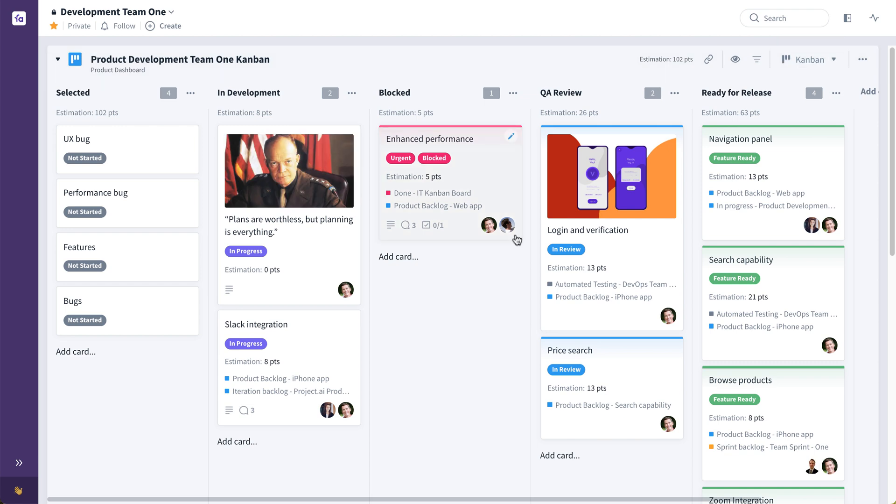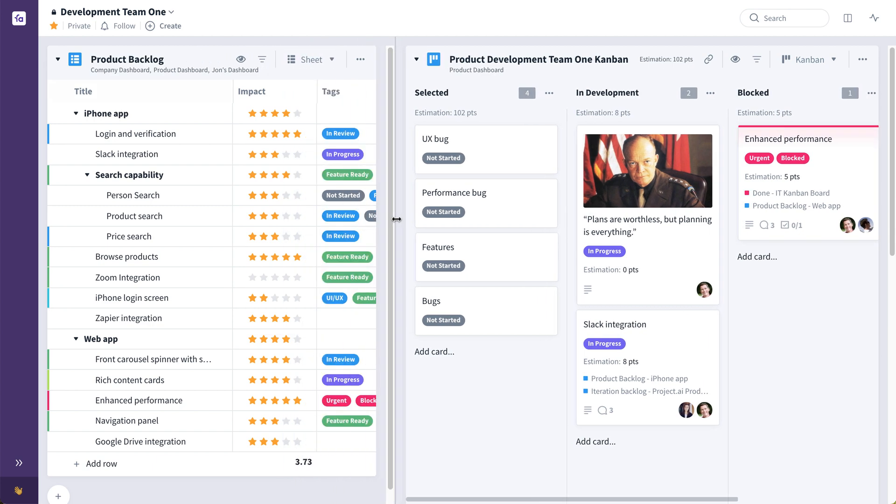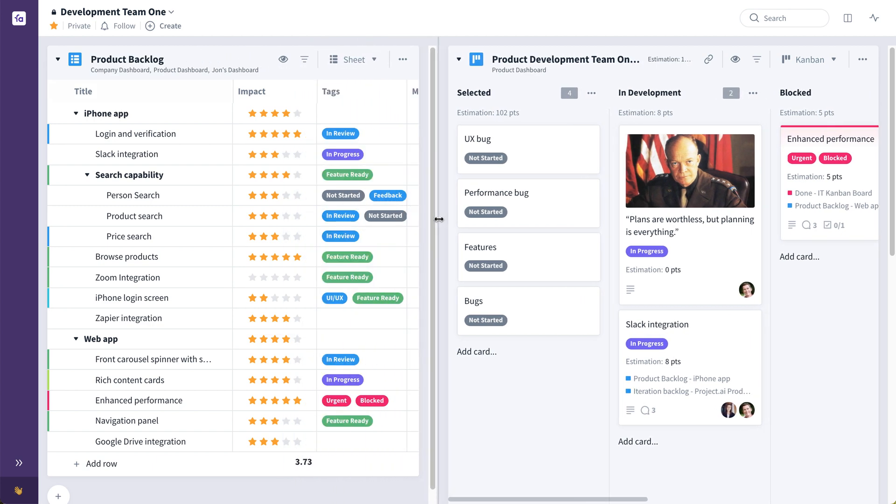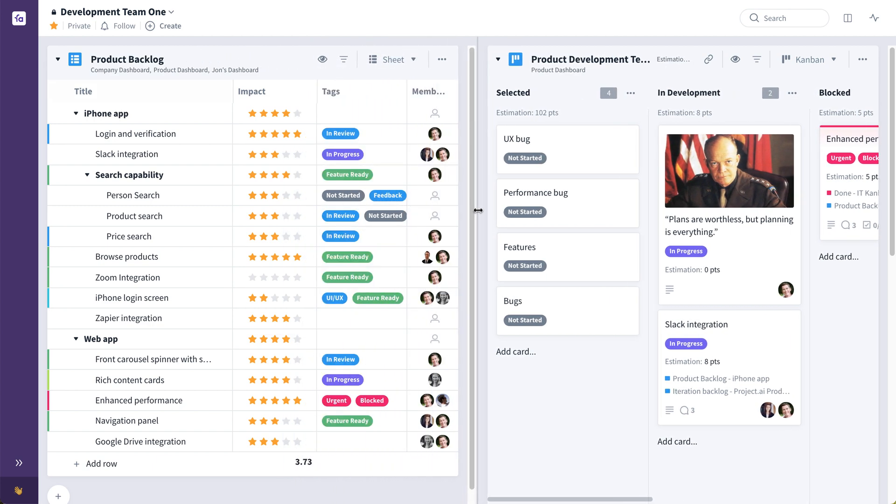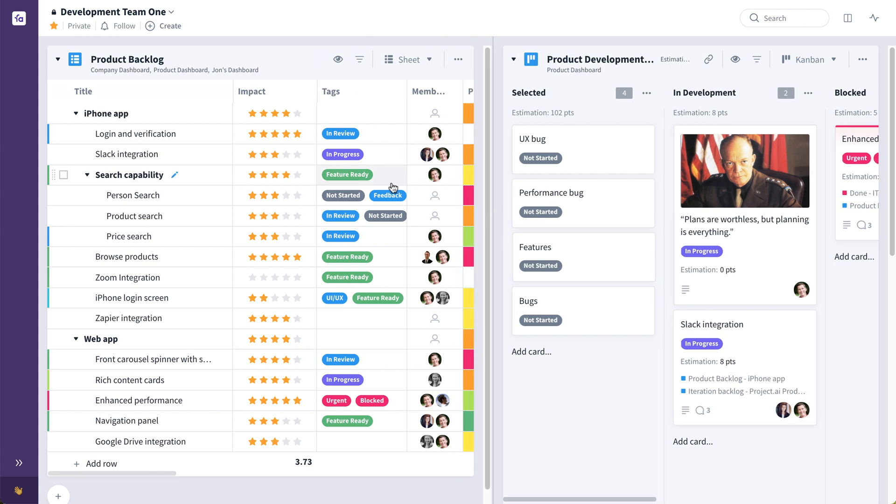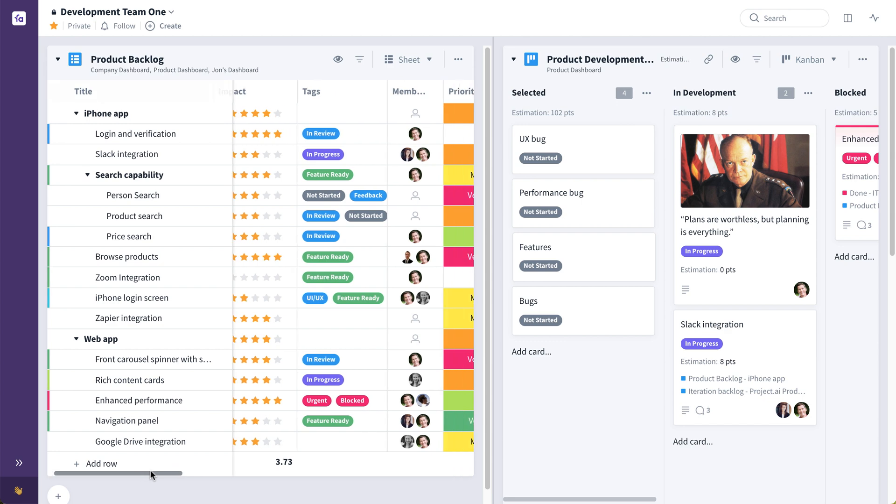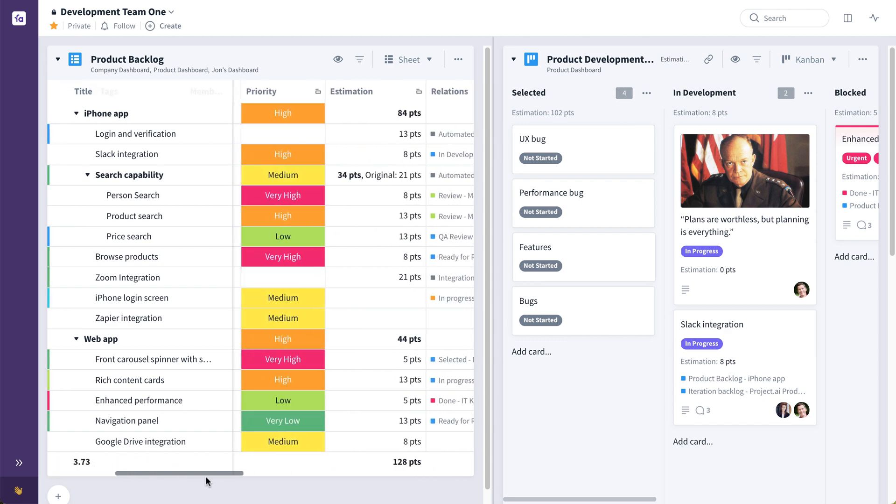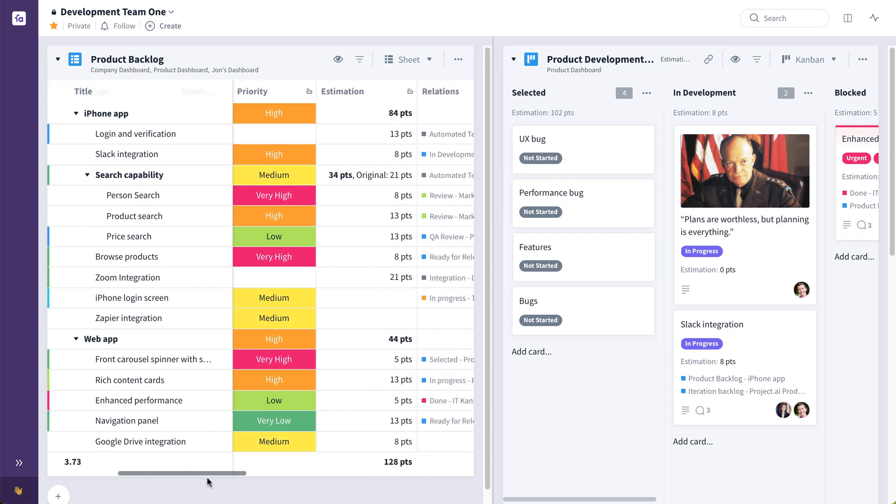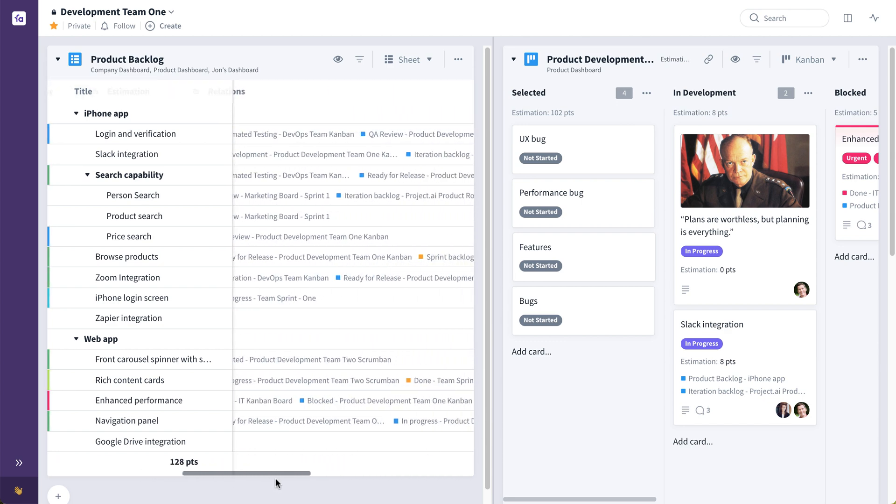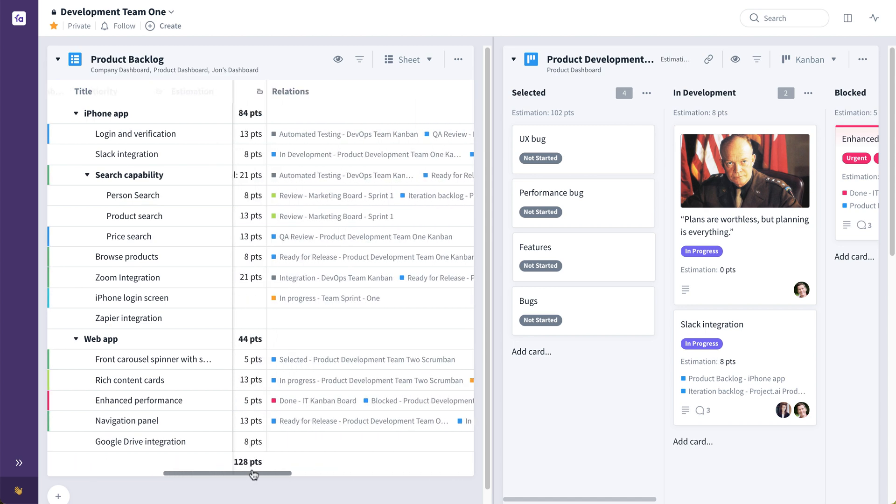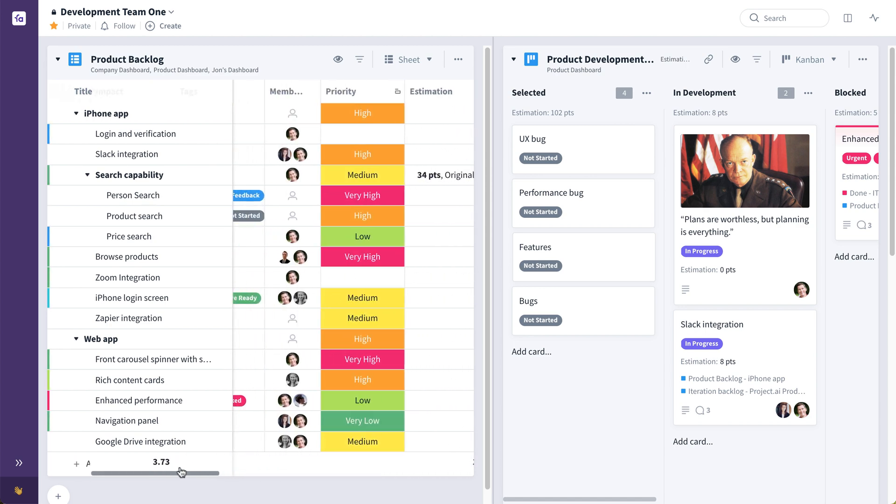Some teams might be more advanced, and they want a full product backlog. And you can see this product backlog over here on the left pane in the Favro interface. This can be a full hierarchical backlog. You can see I've broken this down into maybe the different apps and the different epics, maybe broken down into features or user stories. And you can add whatever custom fields you want, priority, estimation, the relations field, attachments field, so on and so forth.